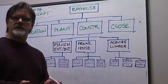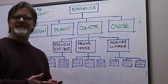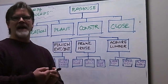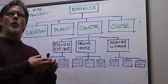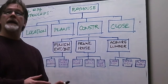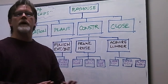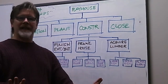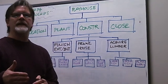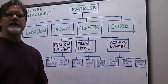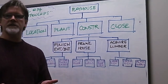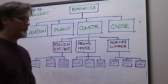The finish-to-start relationship is a hard logic relationship. That means one activity has to be completely — 100% complete — before the succeeding activity after it can begin. That is a finish-to-start relationship.